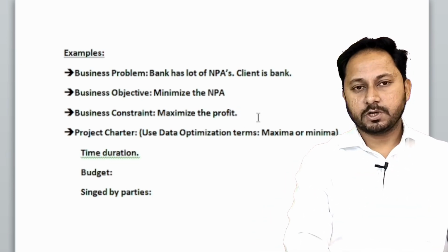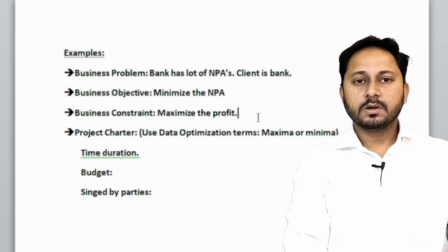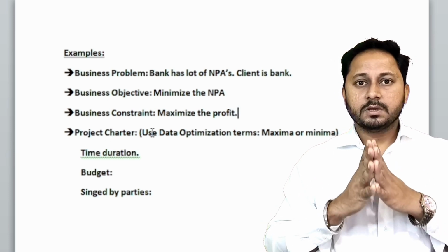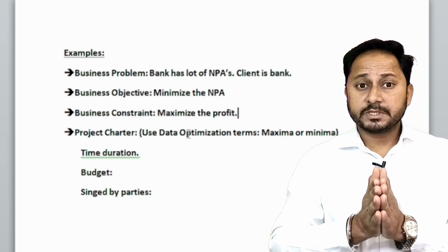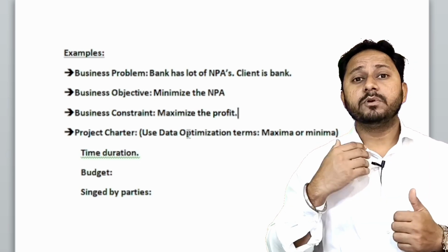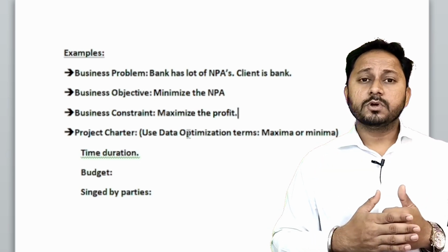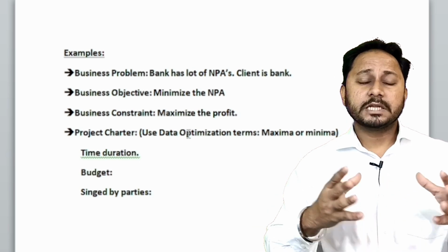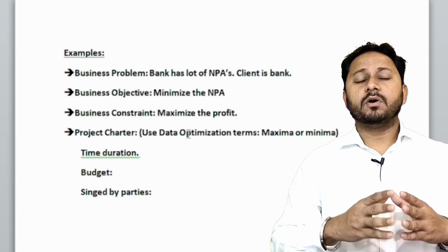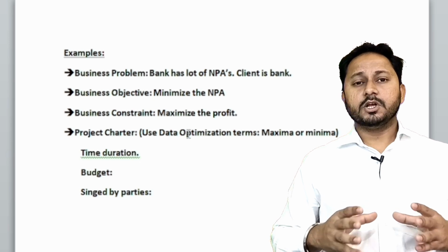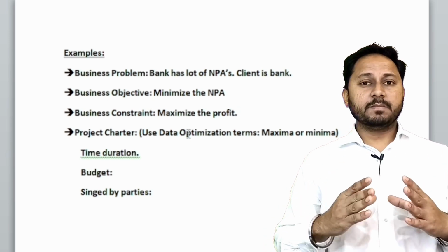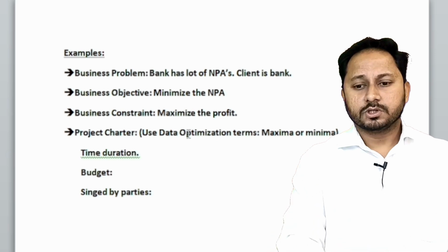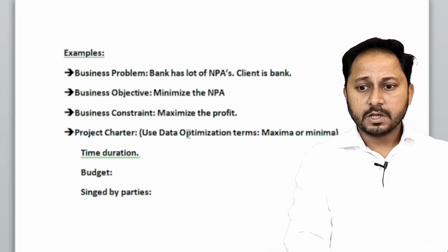Finally, you have to create a project charter. What is the project charter? The project charter is where you describe all your business problems, the business objectives that you are solving, the business constraints, how much time you are going to take to solve this problem, how much budget is involved, who all the stakeholders are, and it will be signed by all the required parties. Right? So this is a kind of agreement between the client and you, on what you are going to do and how you are going to solve the problem.